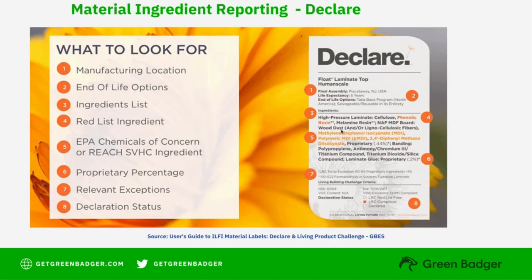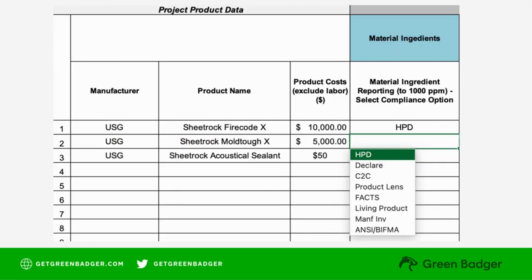We also have an example of a declare label, which tells you what a product is made of in a tidy one-page document. Just make sure the date is valid for the course of construction. To fill this out, simply go to the material ingredient column on the LEED cover sheet and enter the type of ingredient reporting you have for each product. If there is no material ingredient reporting for your product, simply leave that field blank.